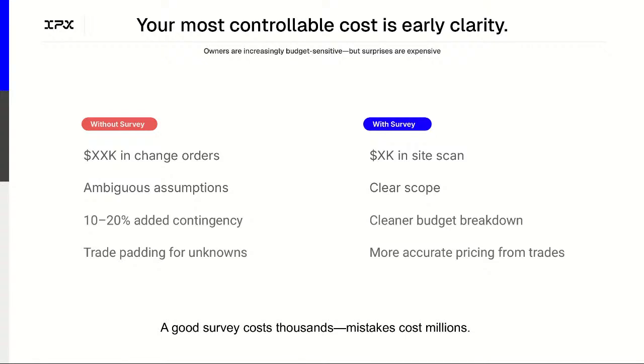And I mean, it's pretty interesting. We do have some hard facts and some hard figures in some of the goodies that we're going to give to you here in a moment. But even to quantify the cost of an RFI, right? On average, it's about $2,000 just internally for the administration and coordination of an RFI. Not even the downstream consequences if that produces delays in a schedule or hits a budgetary item. So you'll see that that's definitely a unit that's very often used.